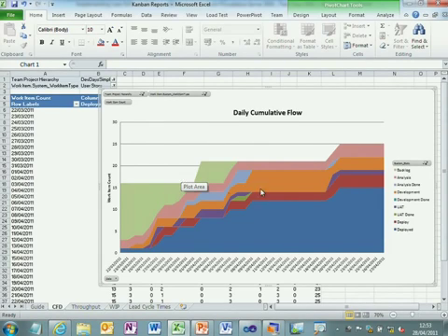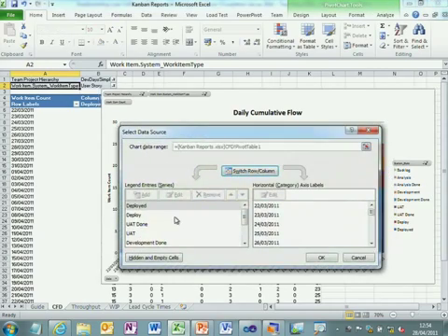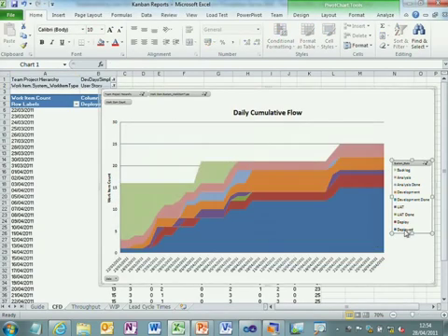And when you actually point Excel at TFS to generate this sort of plot, you'll see all of the work item states coming back in a random order. I think it might be alphabetical. So what you have to do is go in there and reorganize them so that they're in order. Otherwise, you'll get spikes and jags in the graphic.